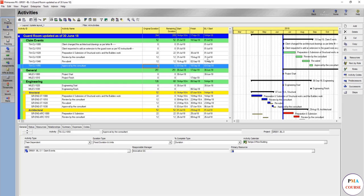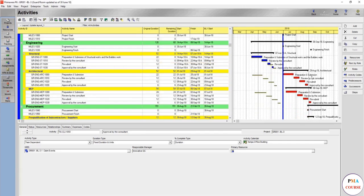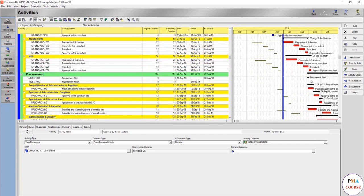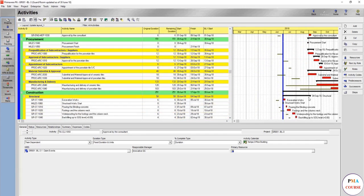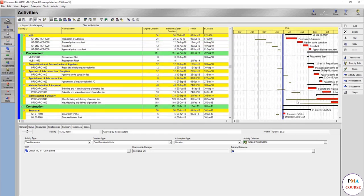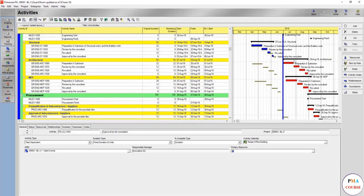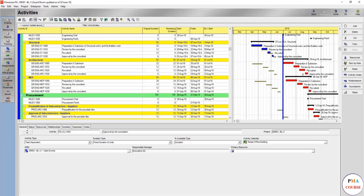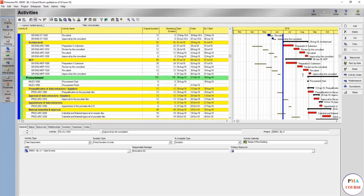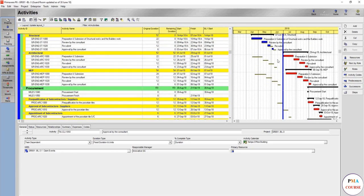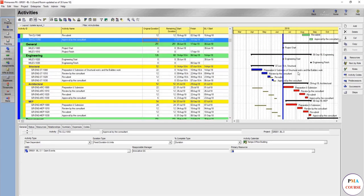And you are going to relate these activities with the excavation here. Now this is the claim, and here you have delayed as well. So now you are going to get the time, but you might not get compensated because you are already delayed.